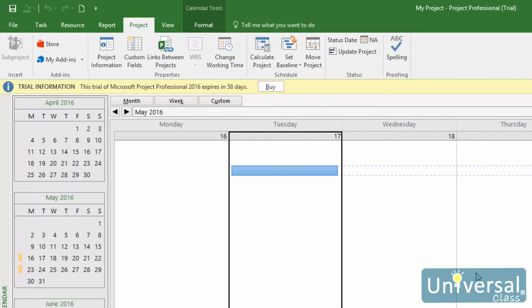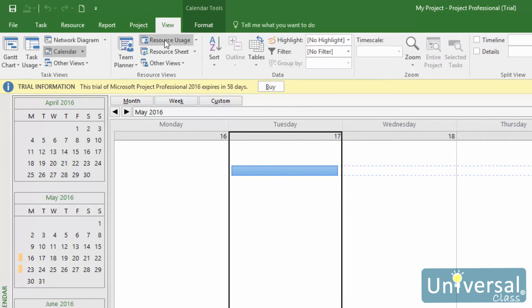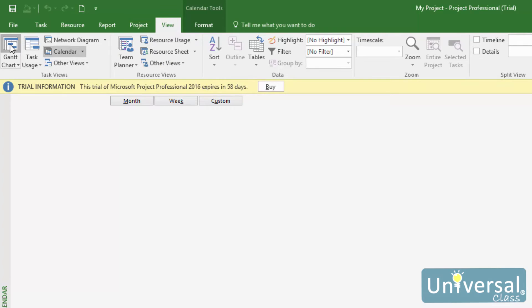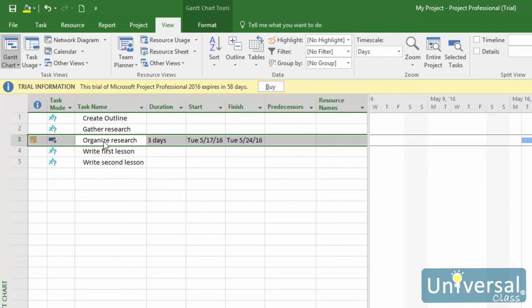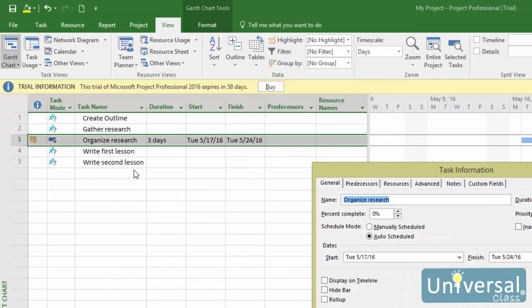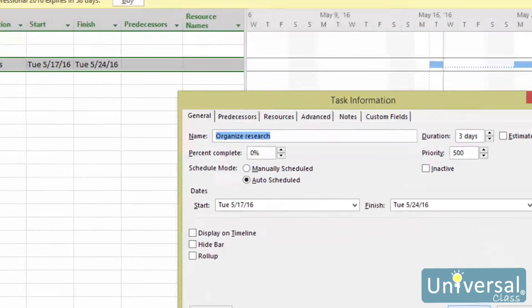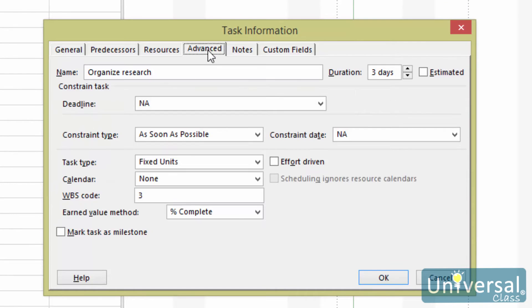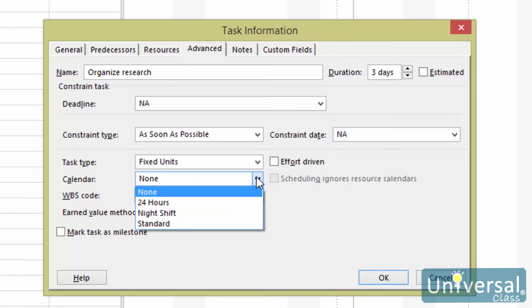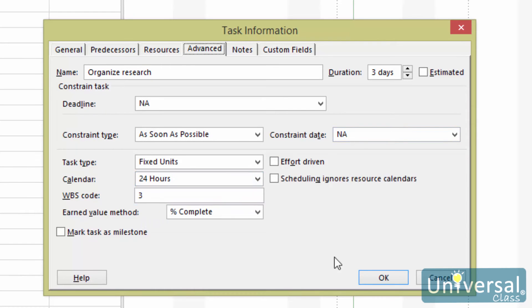To change the calendar you use for a task, double click the task name in the worksheet area of the Gantt chart view. To change back to the Gantt chart view, go to the View tab and click on Gantt chart here. Now double click on the task name. You'll then see the task information dialog box. Click on the Advanced tab, then choose a new calendar from the drop down list. Click OK when you're finished.